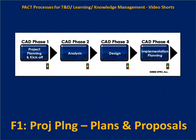In a curriculum architecture design project we use four phases to structure the overall project. This can change — there have been times when the analysis and design phases were combined into one phase simply because there was going to be only one gate review meeting, which is what the upside-down traffic lights represent. Those are go-lights, not stop-lights, which is why they're upside-down.